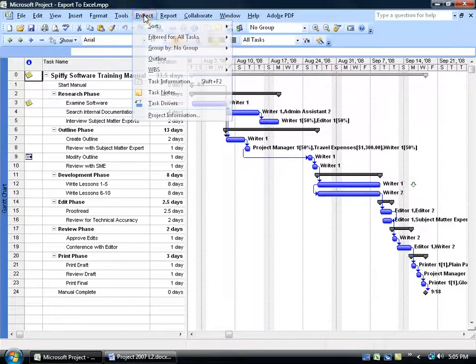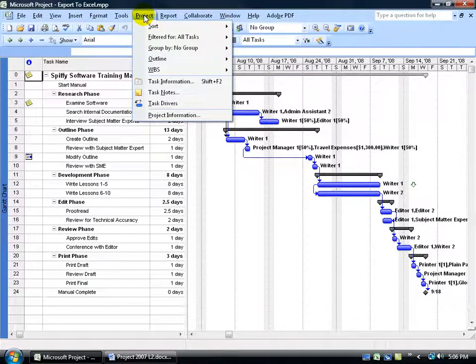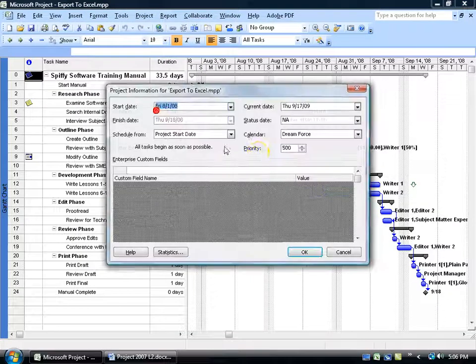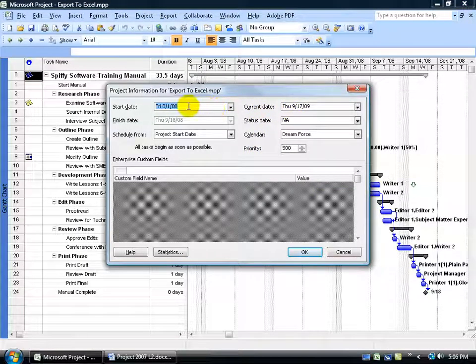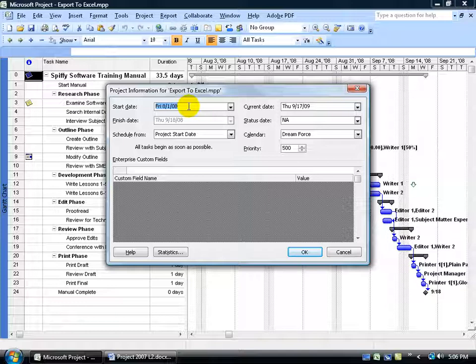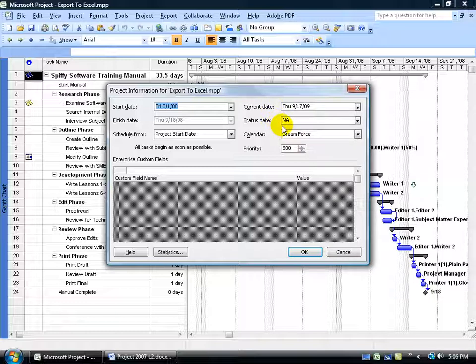If I come up here and click on the Project menu and go down to Project Information, you can see the current date as opposed to the actual start date of the project, about one year apart. Now, the status date is not applicable. By default, the status date will always be the current date when you have it set to not applicable.